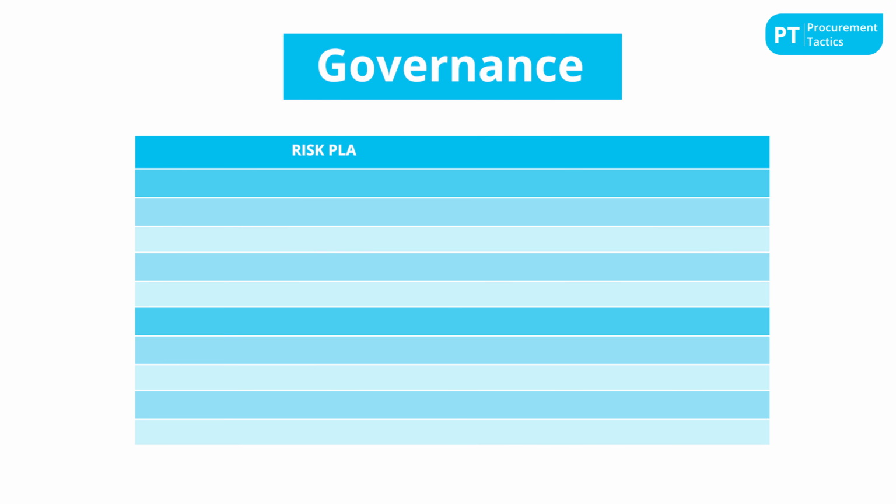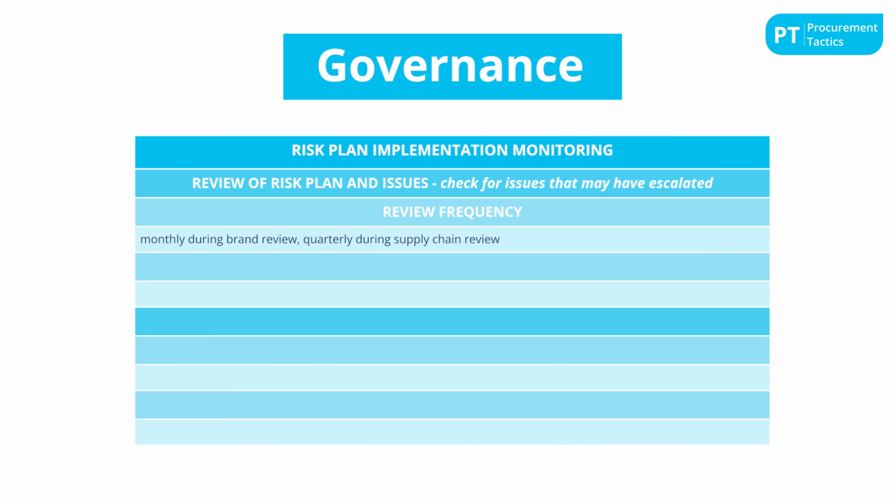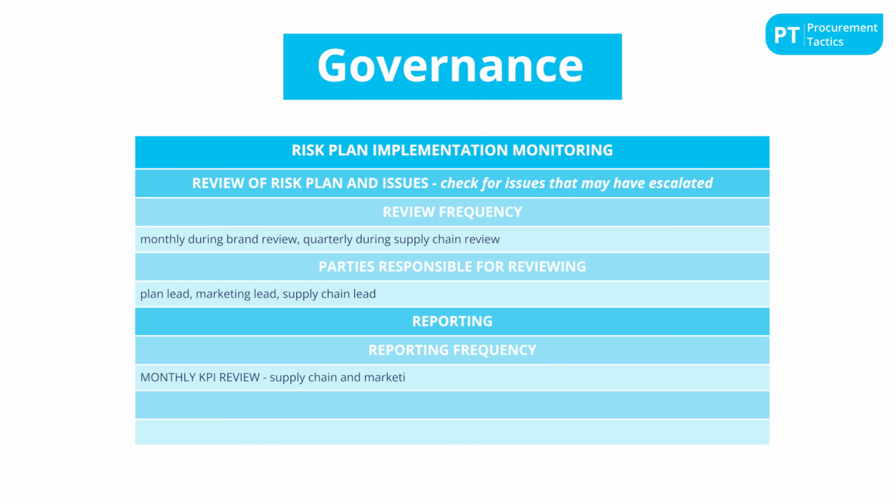Governance. Having a solid plan, even one that's been approved, isn't sufficient on its own. To ensure successful implementation, it is crucial to establish governance over the process and involve the appropriate decision makers in the discussions. It's also advisable to define and agree on an escalation process and events that trigger escalations. For example, it can be a net revenue threshold or an overdue period